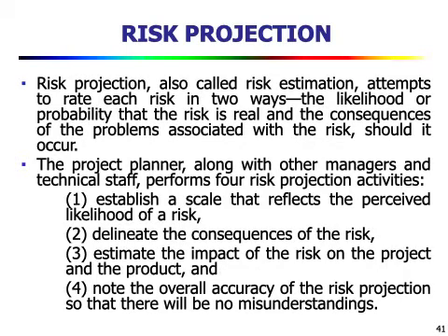Then you can do risk projection. In risk projection, what we do is we estimate the risk. That is simply risk estimation. And risk estimation attempts to rate each risk in 2 ways. That is the likelihood or probability that the risk is real, and the consequences of the problem associated with the risk should it occur. That is, if you have a risk, the probability that it will occur and the impact of that risk. These are the 2 things that you are going to rate.